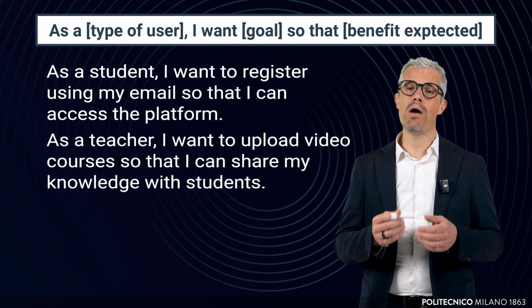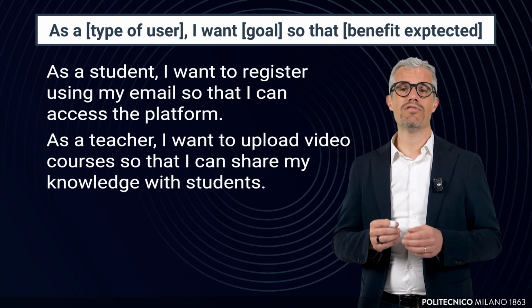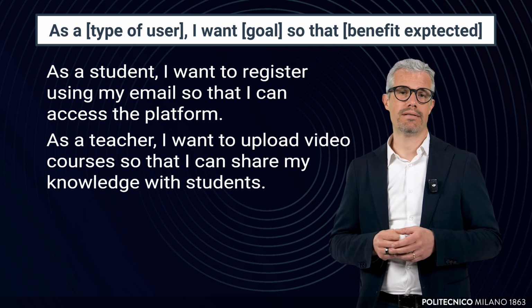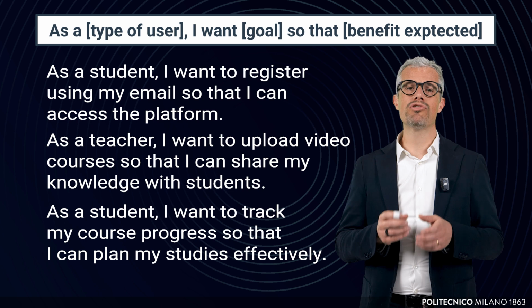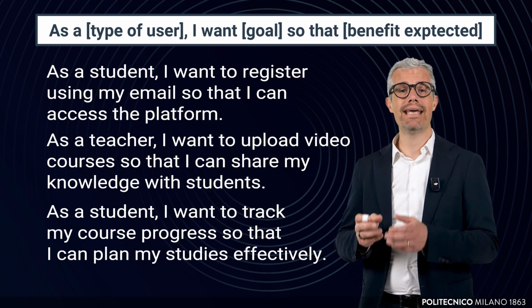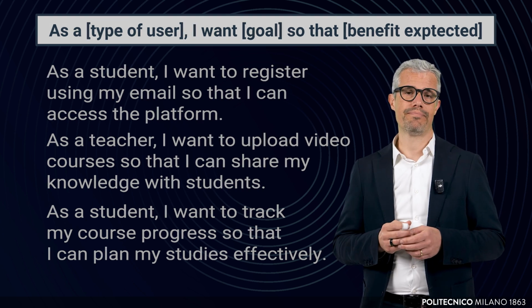As a teacher, I want to upload video courses so that I can share my knowledge with students. As a student, I want to track my course progress so that I can plan my studies effectively. These stories represent discrete units of work that the development team can tackle. The product owner is responsible for crafting user stories, often involving the team to ensure technical feasibility and alignment. This collaboration ensures that the stories are not only valuable for the customer, but also actionable for the team.